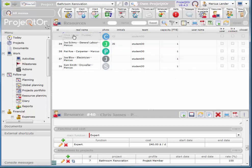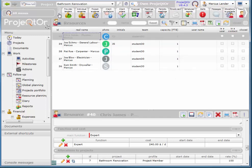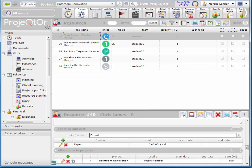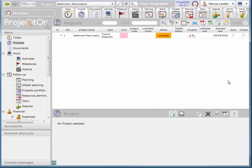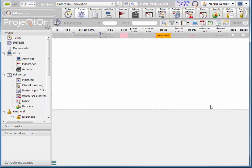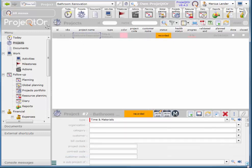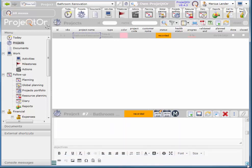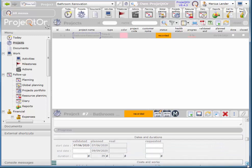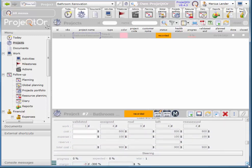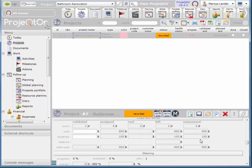So now we can start to get an idea of what the labor is going to cost on this project. So if I scroll down to the end here, and choose projects, and choose my project, and the costs and works section, you see that my costs, this is the resource costs, that's what cost means, is $800. I also have an expense of $100. So this is where we would add all of our material costs.